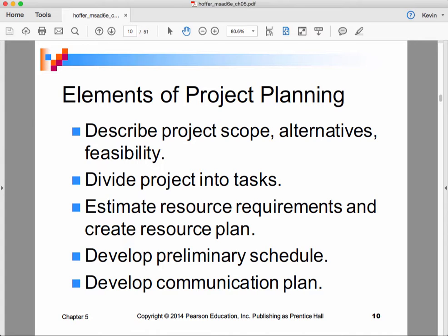So agile people who are following Scrum tend to estimate in terms of points, kind of arbitrary points. We ask each of the teams to come up with a consistent approach to estimation points for their team. There isn't an attempt to turn those into days, and there isn't an attempt to make the points comparable from team to team.